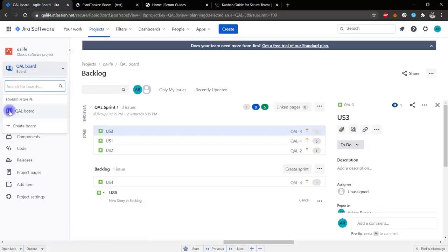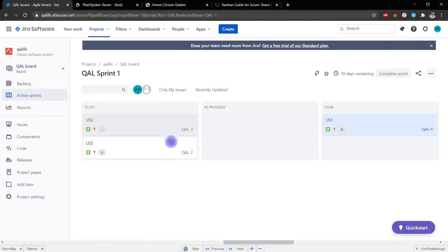We can go to the board of our project and see that we have 2 user stories in the To Do status. In order for us to see how they can be dragged further, I have dragged one of the stories to the Done status. That is when, for example, we have already developed everything, tested it, and shown, for example, a demo. And our product owner has approved that, yes, indeed, this story has been done correctly according to those requirements, those user story acceptance criteria, which he prescribed. This is roughly what our board looks like in Scrum.